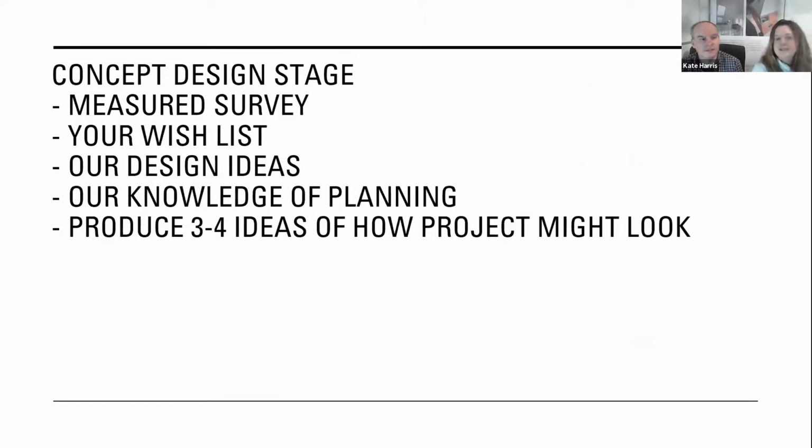So the concept design stage. Once the fee proposal for this stage has been agreed, we will come out and carry out a measured survey of the project and draw up the project in CAD. We will then combine your wish list, your design ideas, our design ideas, and our knowledge of planning to produce 3 or 4 designed concepts to show you how your project might look when it is finished. We find that our clients really enjoy seeing how their finished project might look in 2D and 3D images.